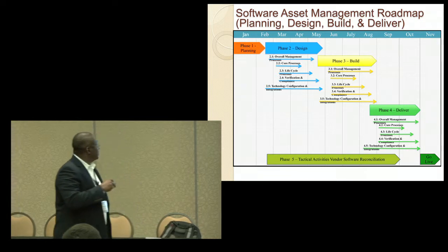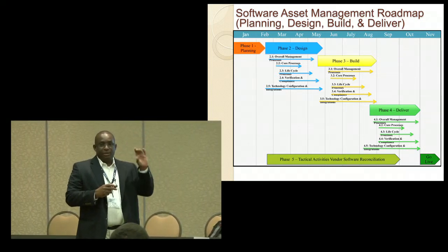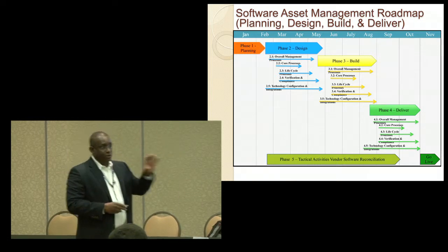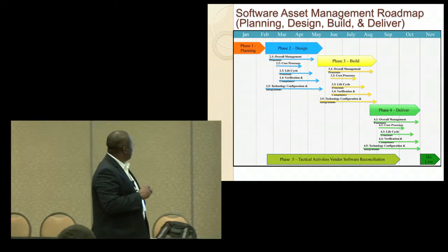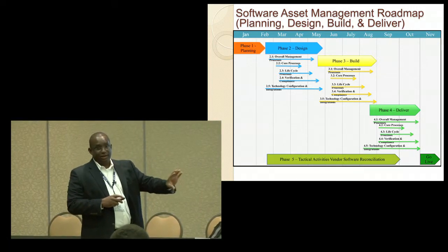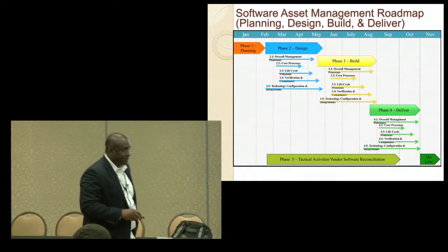You will just replace those names with those core buckets of things, because these are all deliverables, right? And so in your work breakdown structure, this would be, in my design phase, here are the several work products that we have to deliver. And you would go through that through all 4 phases.